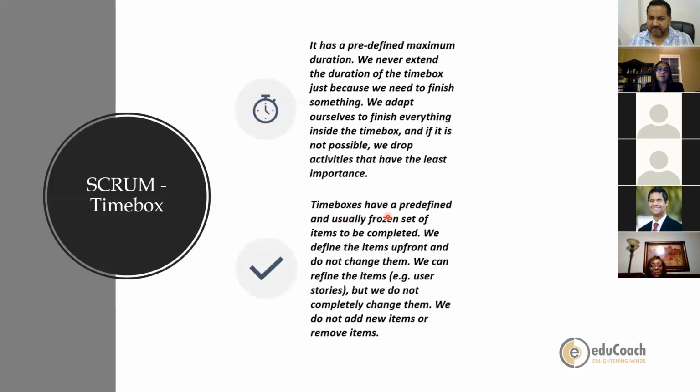Time boxes have a predefined and usually frozen set of items to be completed. We define the items upfront and do not change them. We can refine the items, for example user stories, but we do not completely change them. We do not add new items or remove items.